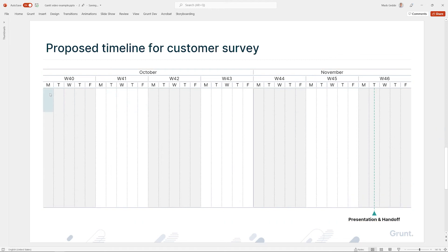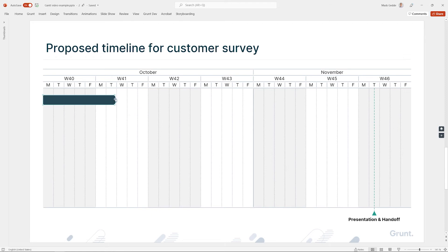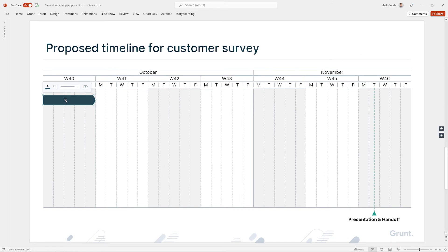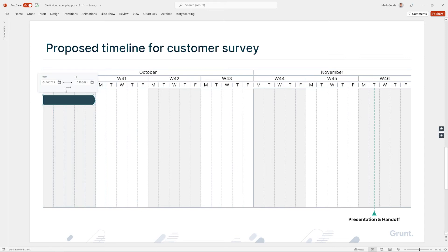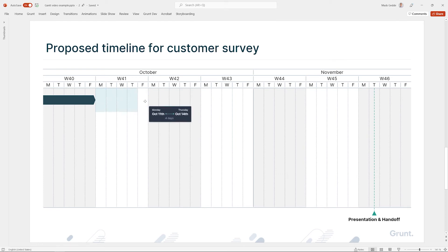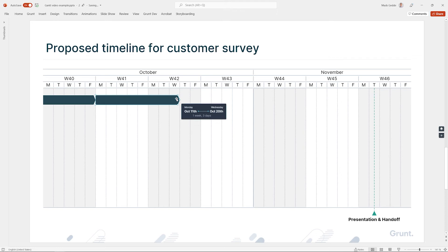Let's start to create some processes. When I insert a process through left-clicking on my chart, it gets a default duration. To change this duration, I can drag either the start or the end of the process — you'll see a tooltip that makes it easy to get this right. You can also click on a process and drag it to a new location, which keeps the duration intact but changes the start and end points. If you want even more control, you can double-click on the process to open up a date picker, letting you choose specific start and end dates from a calendar. Finally, and probably my preferred method, is to click and drag in an empty area of the chart to insert a process directly — this makes it really fast to insert multiple processes at once. If you want to label these processes, you can select one and start typing directly.